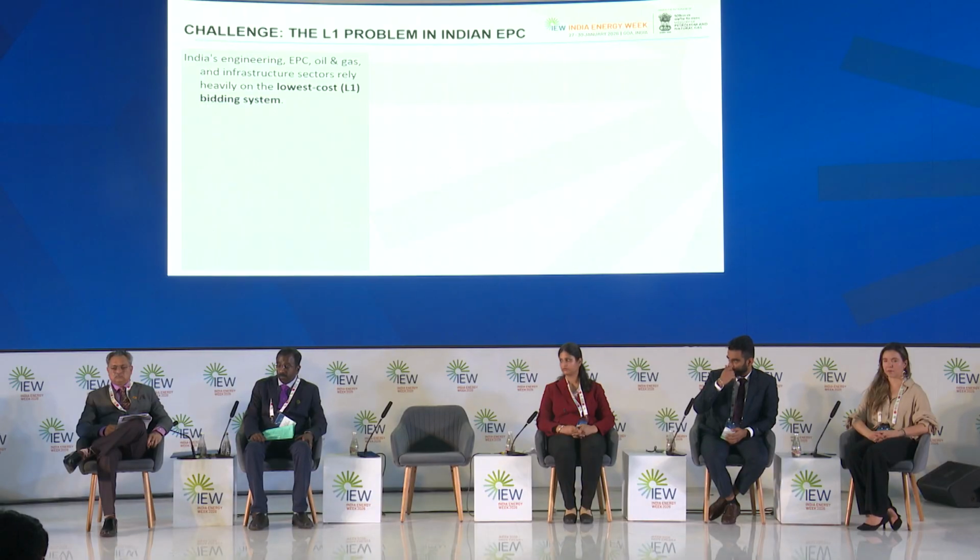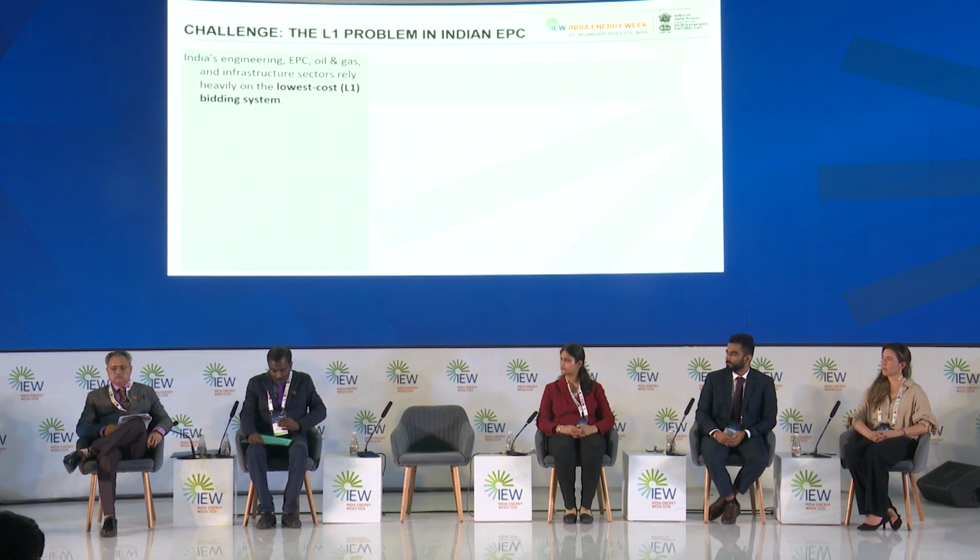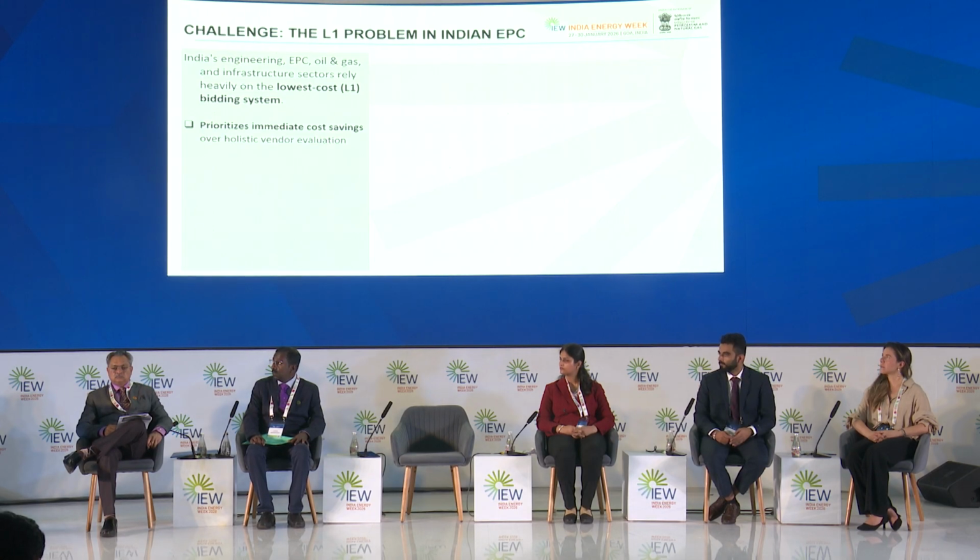So what is the challenge? India's engineering sector has historically relied on the lowest cost bidding system. The logic seems straightforward: select the cheapest bid, save money and move forward. But here is what actually happens. The immediate impact: we prioritize the lowest price tag above everything else. We overlook the critical supplier factors and capabilities like quality, technical competence, financial health and risk management.